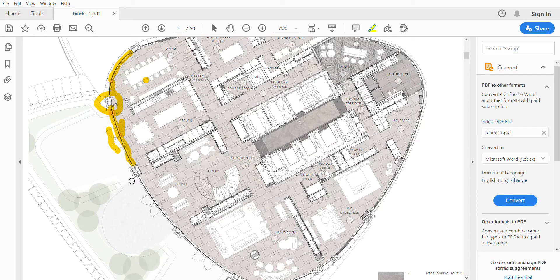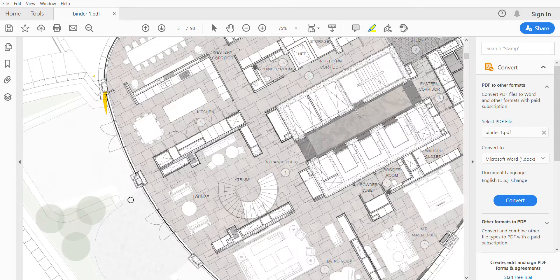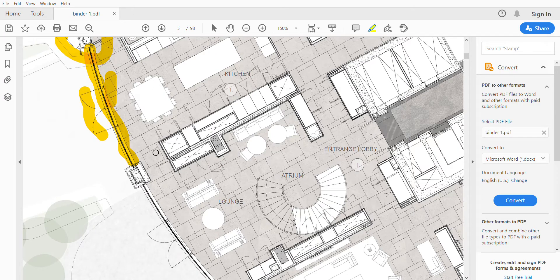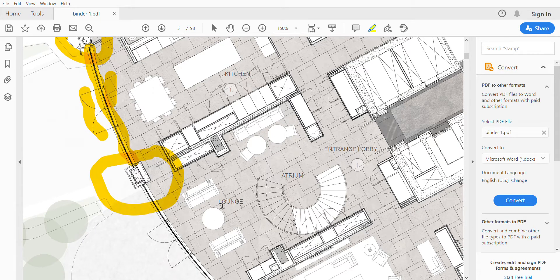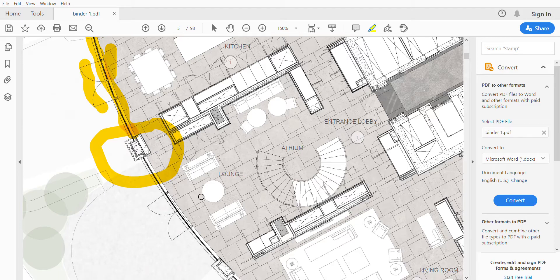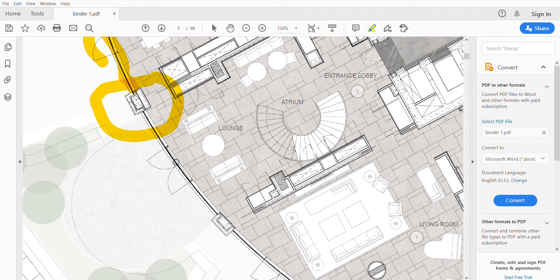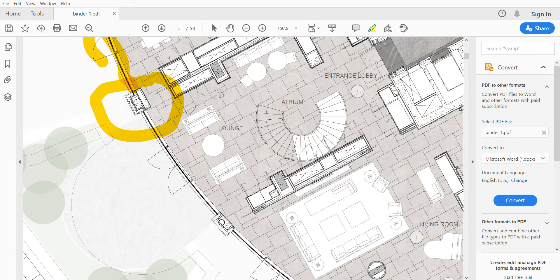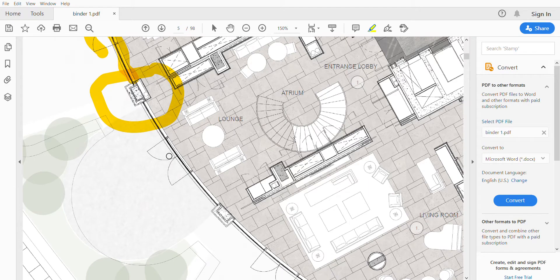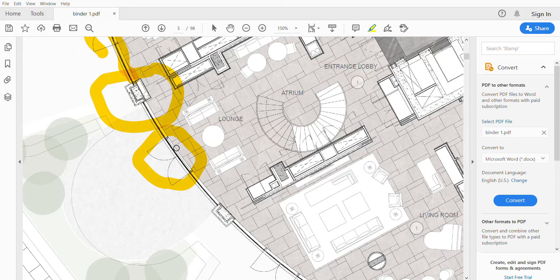And then we go same thing again, which is column cladding, and then after that we go another curtain screen which is curved on plan. You have to bear in mind with this double door which shows us a little bit of curving on the market which is not available, so you have to raise an RFI to architect and clarify the design issue.